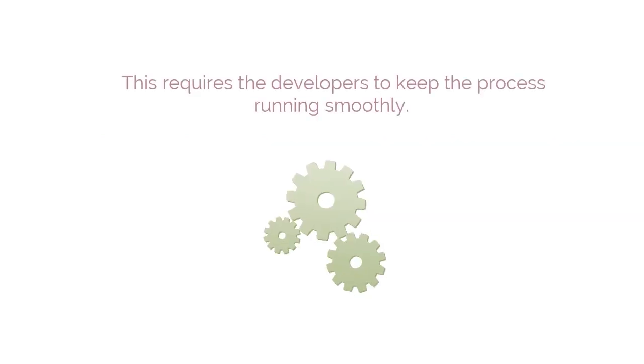This requires the developers to keep the process running smoothly. Allowing too many tasks to remain in WIP must be avoided. A new task can only be pulled when the worker finishes his or her current task.